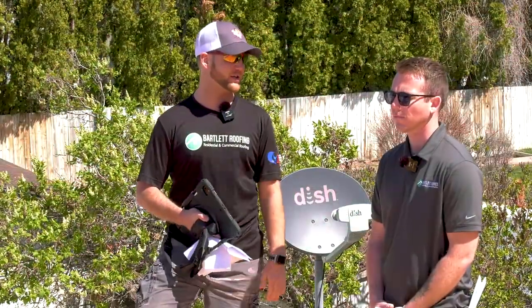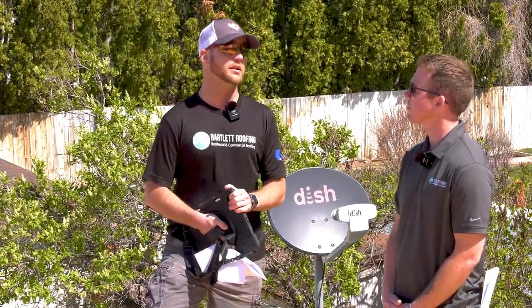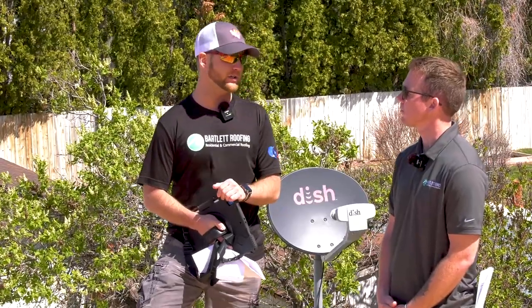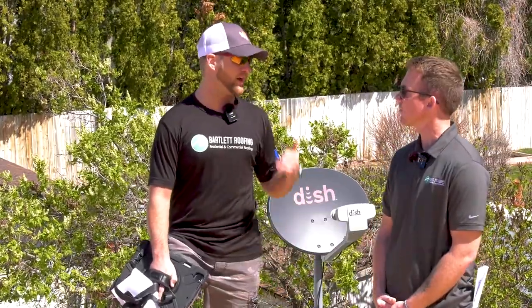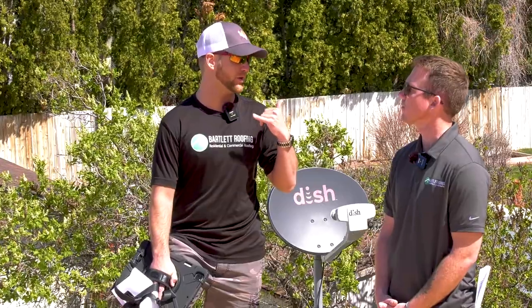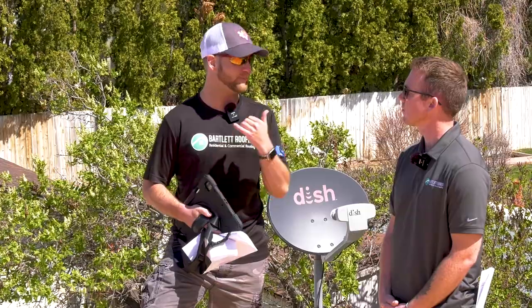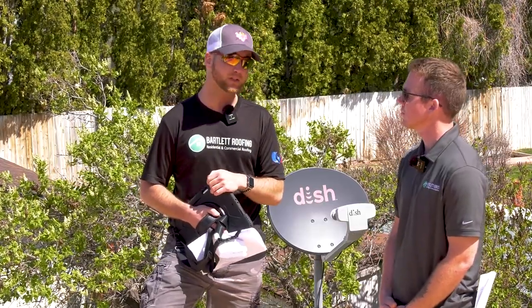Last thing I want to touch on is just if it is applicable in your region or the county or city you're working in, some houses require a deck inspection or an ice and water inspection. So when you come across those, say we needed a deck inspection. As soon as that roof tore off, you're gonna wanna get in contact with your scheduler or production manager. Most of the time, I think it would be the scheduler, and let her know, hey, the roof's ready for a deck inspection. Let's go ahead and get this called in.